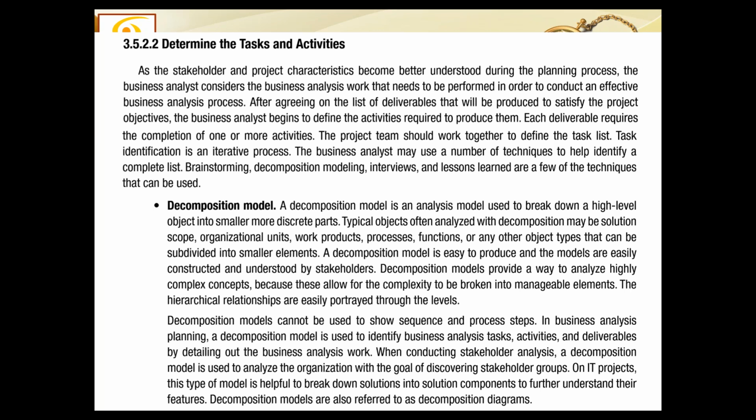As we studied WBS in project management, WBS does not show sequence. Many people are confused about it. They think that the activities shown in a hierarchical structure like WBS are in sequence. They are not in sequence. They are just divisions of a task.